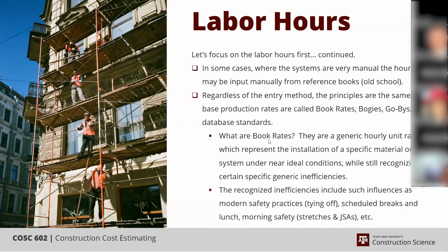One way to picture that is even today, as people put together estimates, even if they have a program like Sage Timberline, if they have a unique activity they go look it up in RS Means or some other reference manual, identify the production rate they want to use, and type it in the system, and it overrides the blank or the lack of information if they didn't have a rate in the system that they could use. Same general process. It's more of an old school approach, but it's perfectly valid.